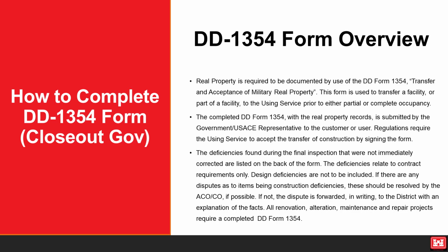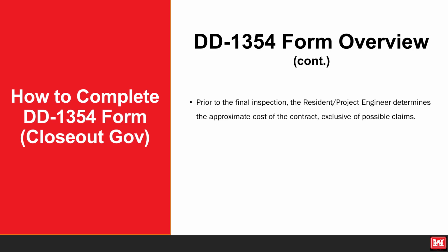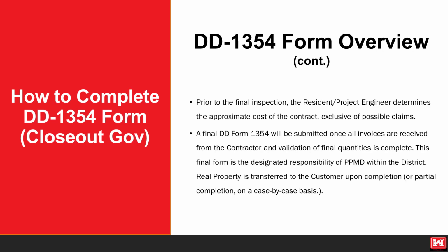All renovation, alteration, maintenance, and repair projects require a completed DD Form 1354. Prior to the final inspection, the resident or project engineer determines the approximate cost of the contract exclusive of possible claims. A final DD Form 1354 will be submitted once all the invoices are received from the contractor and validation of final quantities is complete. This final form is the designated responsibility of PPMD, or Programs and Project Management Division, within a district.